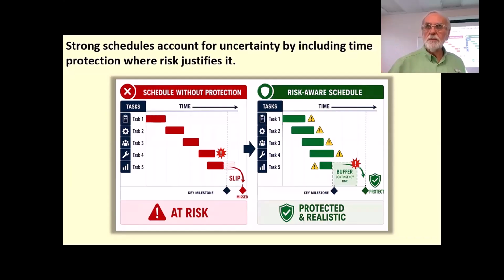We want to say, well, if it happens, then maybe we'll have vendor B on standby so that we can get that backhoe here once we identify that. So that's a contingency. What do we do if something happens? Now, with risk, we can also mitigate and try to reduce the impact of that. And one of the things about risk management is something we want to continue to do all throughout the schedule management process.